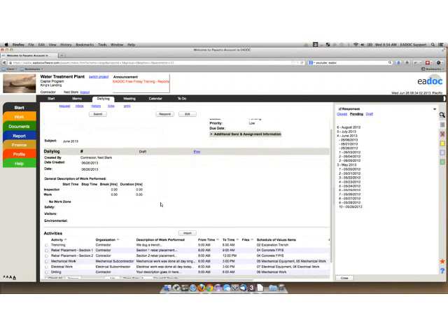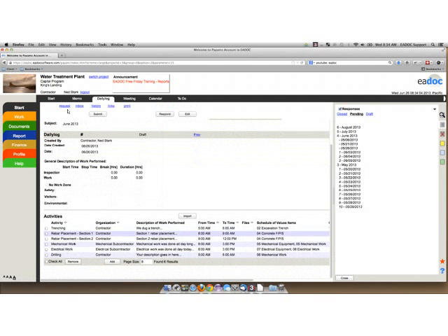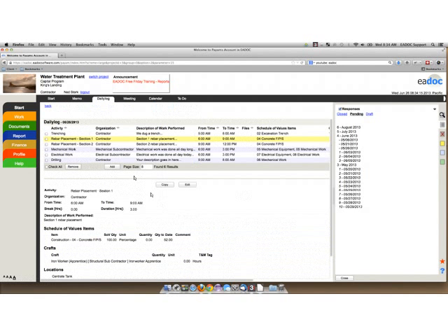So that brings in all my previous day's activities, which is awesome because it'll reduce the amount of work and data entry that you have to input. Keep in mind that when you import, you're going to have to input your quantities. When the import happens, it zeroes out all the quantities. That's to make sure that the inspector is actually reviewing what's on the activities and making sure that those quantities don't just get auto-populated.